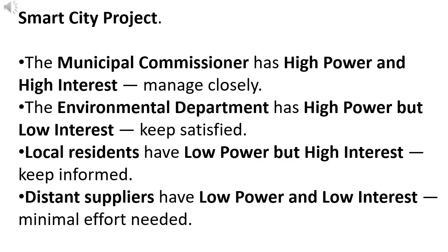Let's take an example. Imagine you're managing a smart city project. The municipal commissioner has high power and high interest: manage closely. The environmental department has high power but low interest: keep satisfied. Local residents have low power but high interest: keep informed. Distant suppliers have low power and low interest: minimal effort needed. By mapping stakeholders this way, you can prioritize your time and communication effectively.